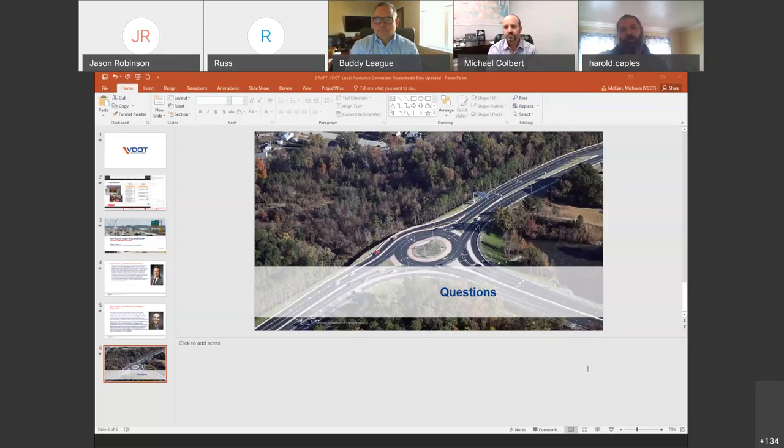The pre-bid, I want to talk about that. We do showings or pre-bids. We discourage them, unless we can answer the question I always ask our districts and project development folks who are putting together these packages: what are we trying to convey? What's the pre-bid about? If it's that important, the question is, is it mandatory or non-mandatory? I'd be interested to know from the locality's perspective. If they're having non-mandatory showings, typically we don't get a lot of involvement because it's non-mandatory and everybody's busy doing other things. But when you require a mandatory one, you could potentially be restricting competition, because if they can't make it, then you lose a potential bidder.